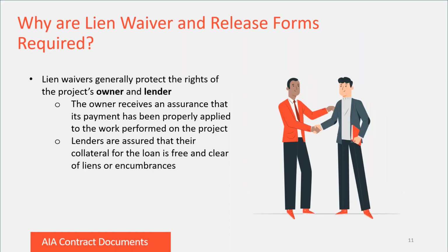Why are these forms required? Depending on their terms, lien waivers generally aim to protect the rights of the owner and the lender. The owner receives assurance that payment has been properly applied to the work performed on the project. Lenders also receive assurances that its collateral for the loan is free and clear of liens or encumbrances.